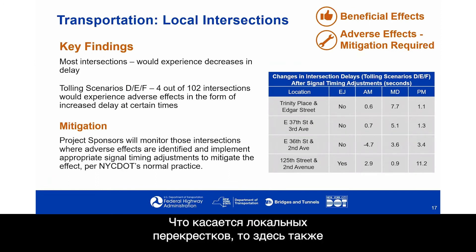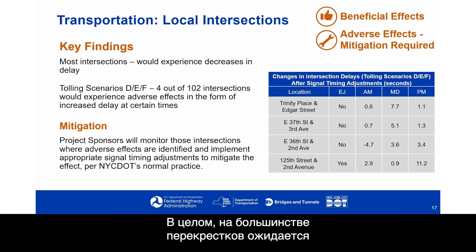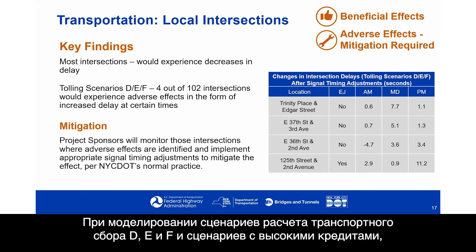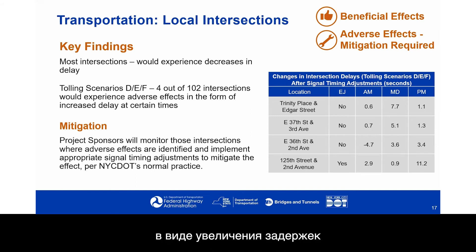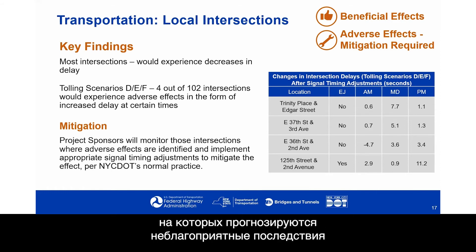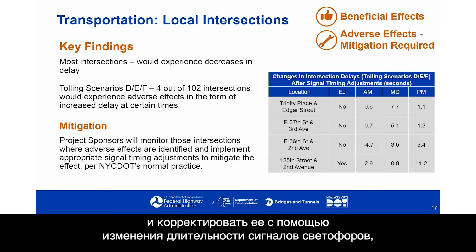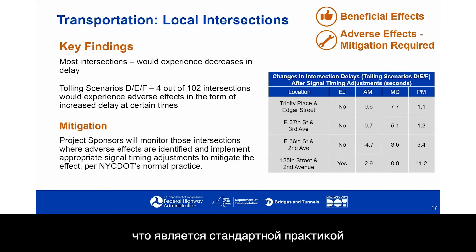With respect to local intersections, there are both beneficial effects and adverse effects where mitigation is required. Most intersections would experience decreases in delay. Tolling Scenarios D, E, and F — the high credit scenarios — have four out of 102 intersections that experienced adverse effects in the modeling in the form of increased delay at certain times, and these are shown on the right. Project sponsors will monitor those intersections and implement appropriate signal timing adjustments per New York City Department of Transportation's normal practice.